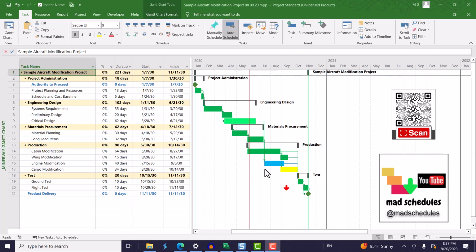When you have 1,000 to 2,000 lines or more, it's harder to have finish to start relationships on 95% of your schedule. You probably are going to be around the 80 to 85 percentile. More than that is not very good for your schedule. You have to aim to have a very high amount of finish to start relationships in your schedule.